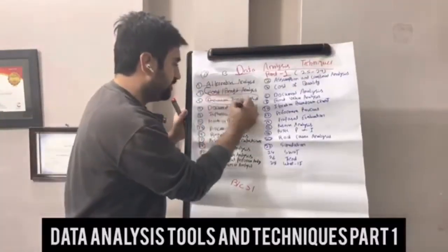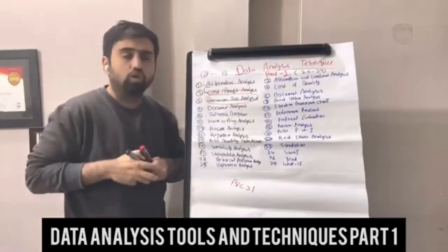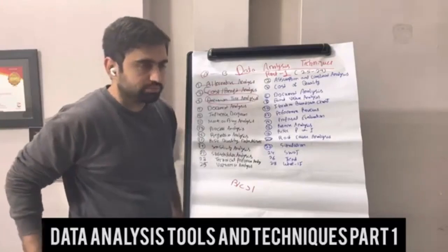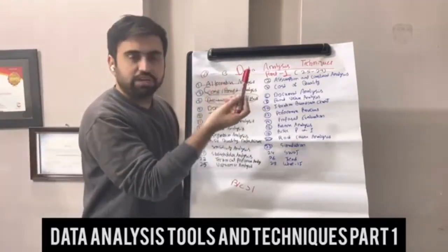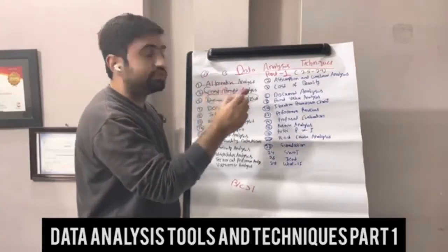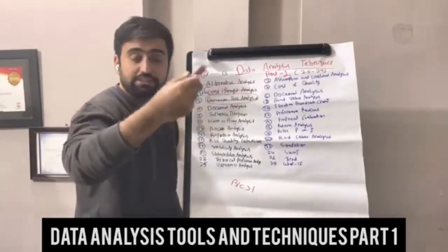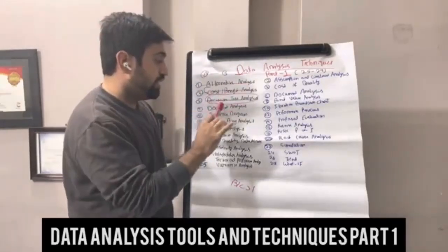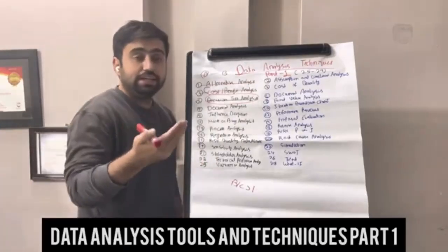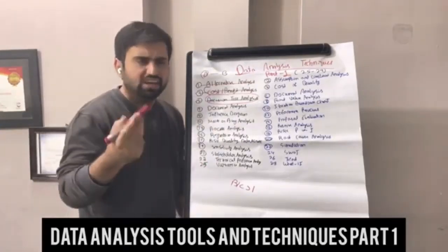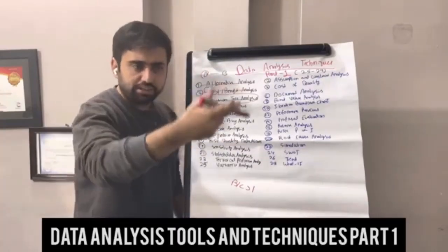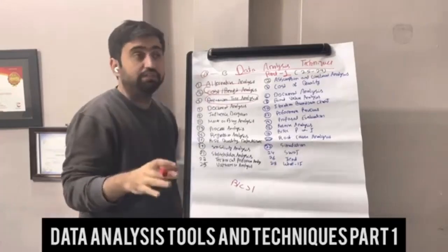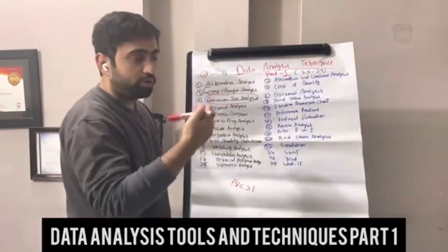Decision tree analysis. The next is very straightforward, document analysis. Now, this technique is specifically used, also these techniques can be alternate analysis whenever you are comparing. Cost to benefit analysis is basically used especially in the business case area, and decision tree is used in quantitative risk analysis. Document analysis is specifically used in identifying risk and identifying stakeholders. It can be used in many other areas, like quality and manage quality, but for stakeholder analysis and identifying risk, this is very important because we are reviewing the document.